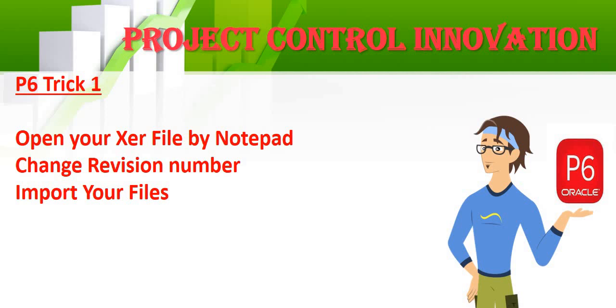How to import a Primavera XER file if you have a P6 version 7 and you get another version 17 and you are not able to import that.